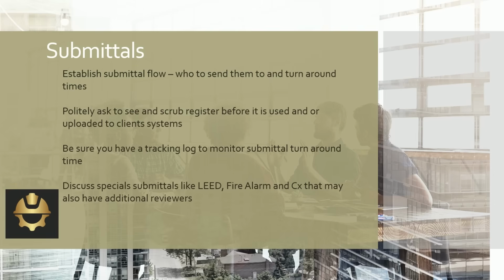And so if you get any pushback of, well, we really don't want to hone that register down much, usually one polite conversation with the lead designer works: we understand you need to see what you need to see to make sure your design's being implemented, but at the same time, any erroneous or additional submittals is going to cost your firm time and money too. And once you say those words, time and money, they usually loosen their reins on that register a little bit, and then they'll let you hone it down.